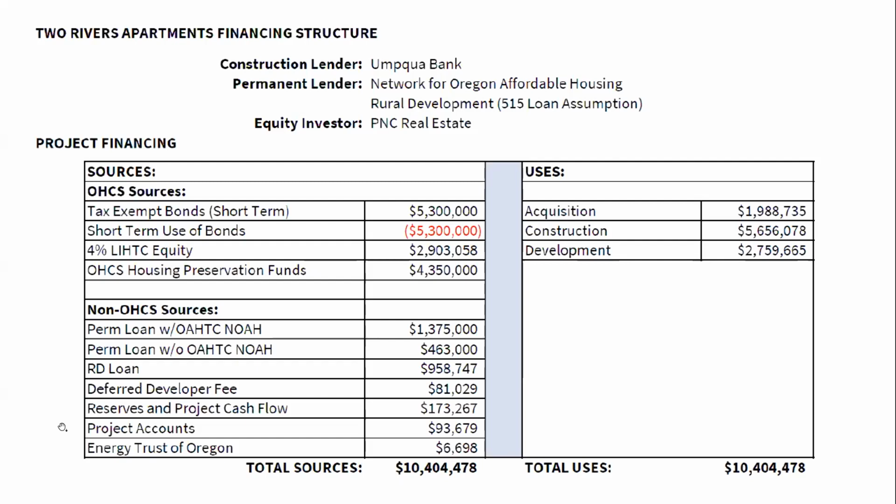Of course, the goal always is the physical structure and the exterior envelope, and then what we can do on the interiors. On these particular projects, as you can see from the pictures, we were able to do siding and roofing and replacing old wood stairs. And then we did substantial interior rehabs with cabinets and flooring and appliances on all the units.